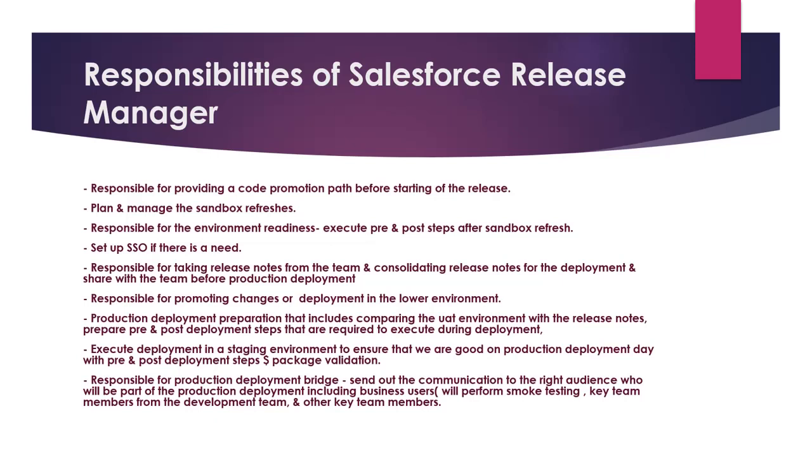And the last thing is being responsible for the production deployment bridge. Basically, the release manager will be sending out communication to the right audience who will be part of the production deployment, including business users. They'll perform smoke testing, and key team members from the development team should be there in the bridge, and other key team members like project management, solution architect or Salesforce architect could also be there.